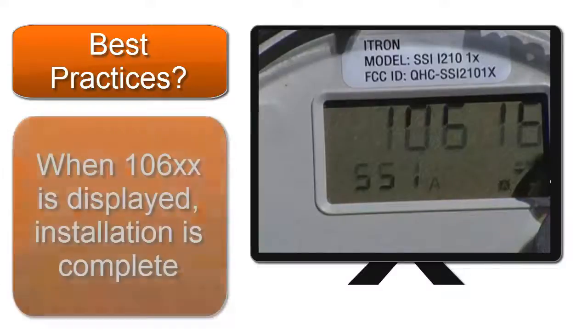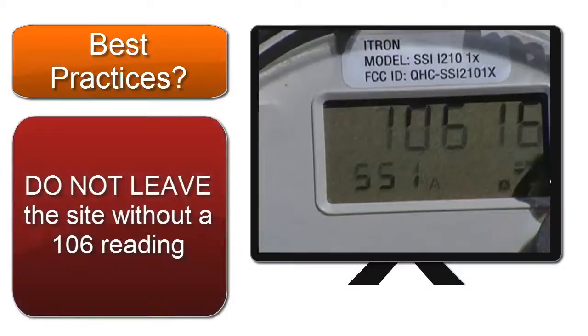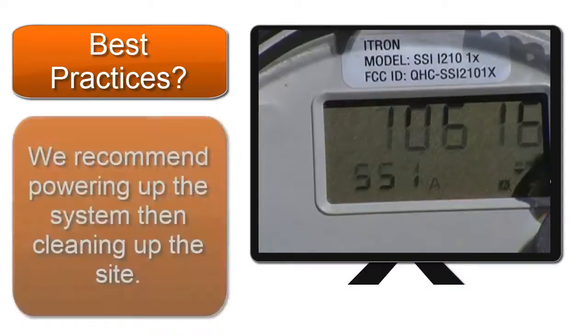If 106XX is displayed, the installation has completed. If not displayed after 5 to 10 minutes, do not install the meter. Do not leave the site without a 106XX reading.